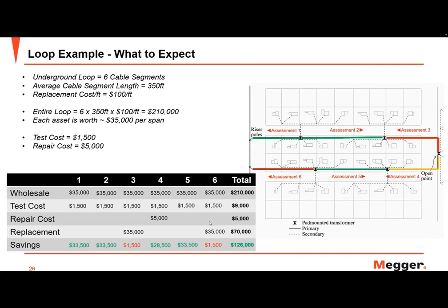But think about everything else that we've also done here. We're actually doing more with less. So project management, there's efficiency here. You're only replacing 2 cables and repairing 1, whereas a wholesale replacement approach would have required replacing all 6 cables. So there's project management. You're going to finish a project quicker, 2.5 times quicker.